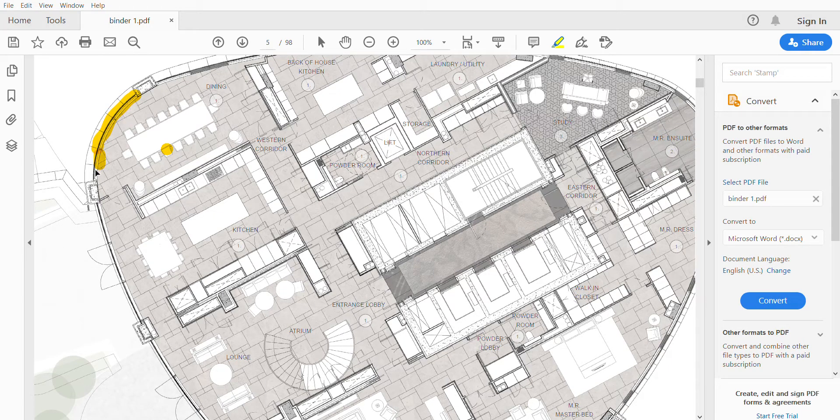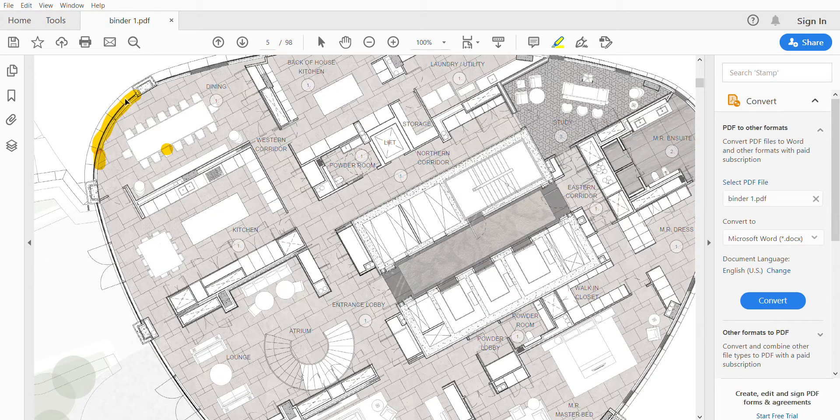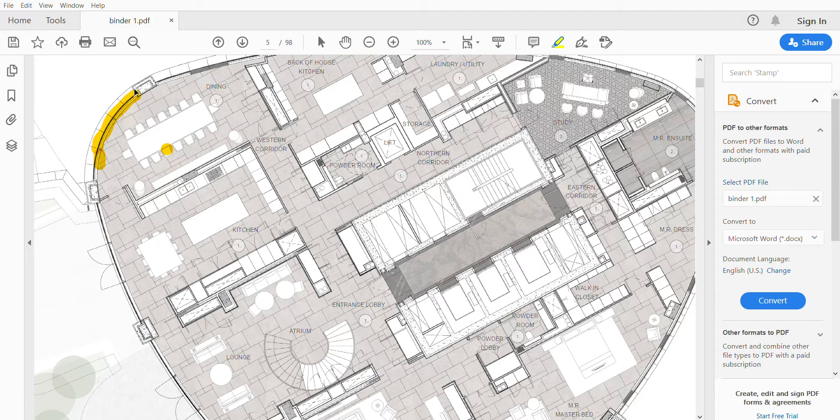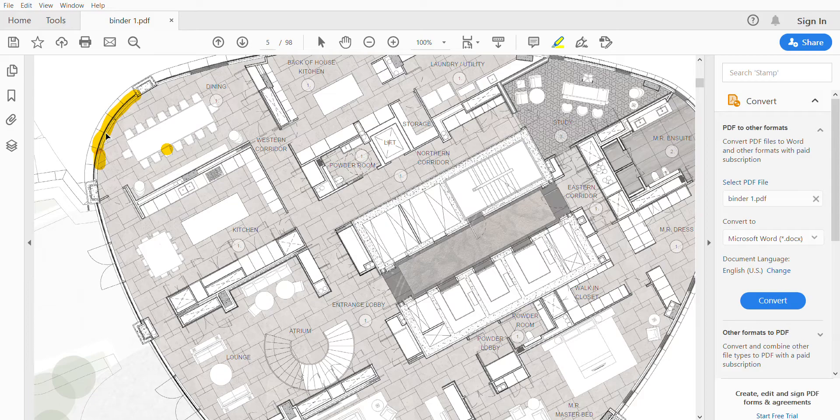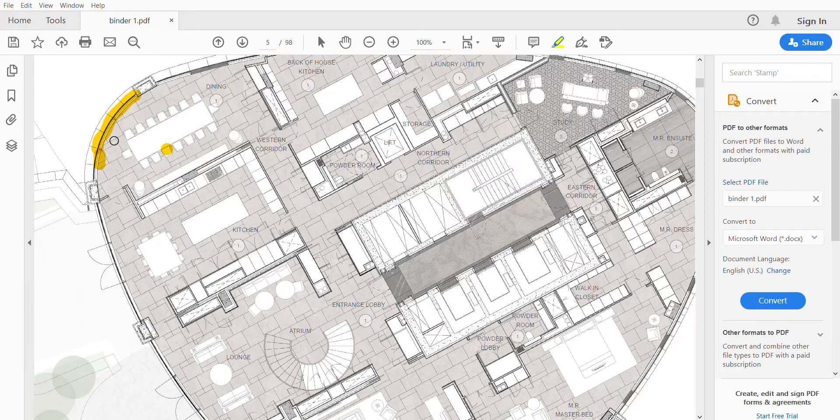This is classed as curtain walling. And then this is a curved on plan curtain walling. When it comes to curving glass, which is more expensive and obviously longer time, sometimes I think there is one or two suppliers in UK who can provide curved on plan glass only. So you have to go somewhere in Europe to buy this special glass.